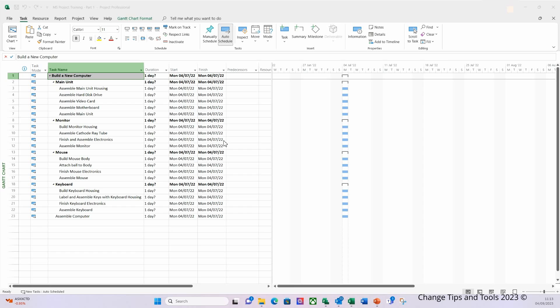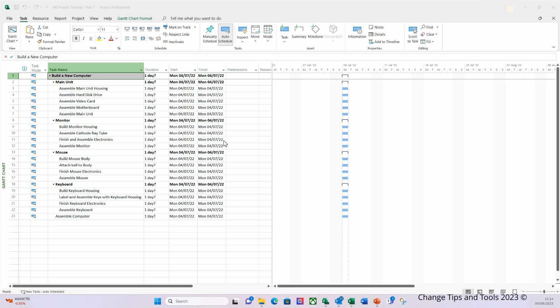Now during your workshops you will have received estimates which could be work or duration based information. You can estimate the time that you will take to complete a task within MS Project by entering either work or duration based data. Work is the amount of effort or person hours needed to complete a task, and duration is the amount of actual time that will pass before the task is completed. If you estimate via a work based approach, it's important to remember your task duration will not be calculated until you assign a resource. Alternatively, if you enter expected durations, your task's work or effort will not be calculated either until you assign a resource to your task. Let's insert the work column and see how we enter estimates via a work based method and an expected duration method.